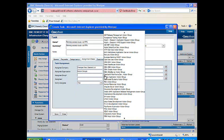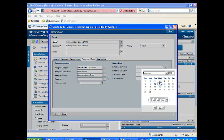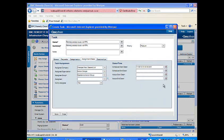To assign a group to the task, click the assignment dates tab. Use the drop down boxes to select assignee organization and assignee group. It is very important that you only select action groups at the assignee organizational level. Add the scheduled start and end date, then save.